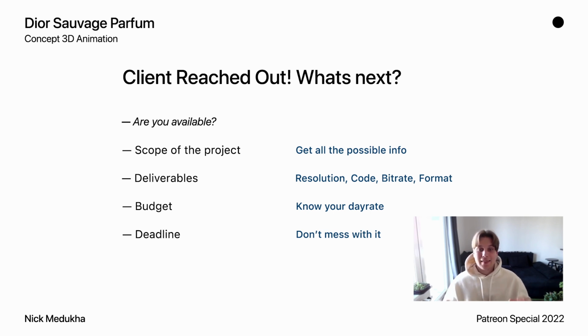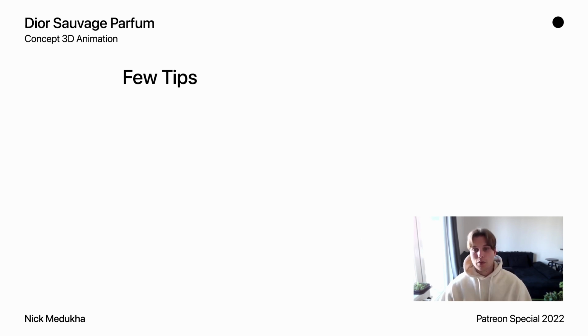In this email, you either agree, decline, or if it's the email where you need to tell the budget, you tell the budget based on the info you gathered from the call and your estimated time needed to finish this project multiplied by your day rate. And now a few tips based on my previous experience.